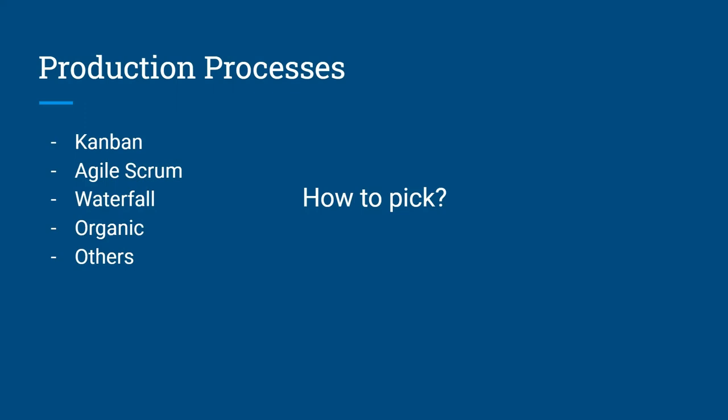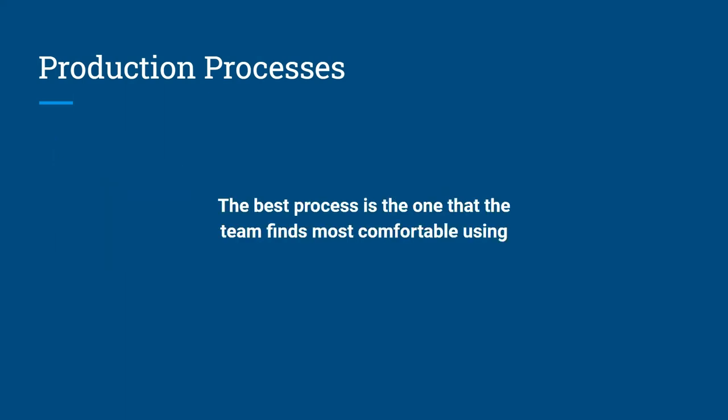But most importantly, the best process is the one that the team finds most comfortable using. Because in the end, they're the ones using the process. They're the ones giving you the information of, hey, I'm doing this right now. Hey, this thing's going to get delayed. And you want to give them a process that is easy for them, that they're comfortable using so that it's easy for you to talk to your team. It's easy for you to get information from your team and it just benefits you and your team overall.